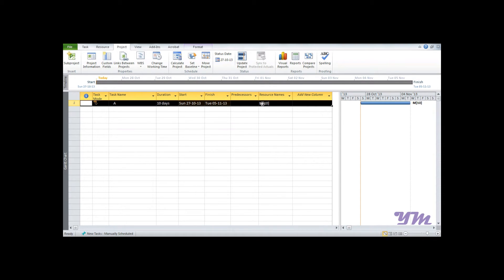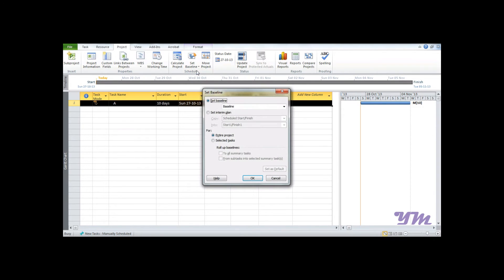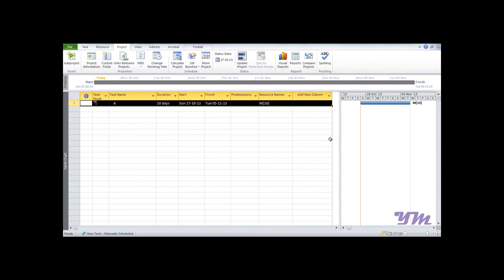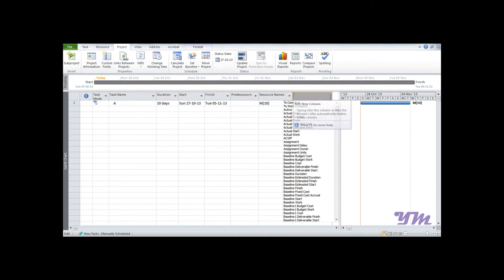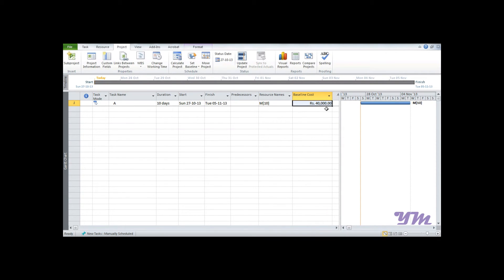Click on the Project menu, Set Baseline, and set baseline. Make sure you have selected Entire Project and click OK. Now go to Add New Column and select Baseline Cost. The cost of the project for the 10 days comes out to be 40,000, as we already know.